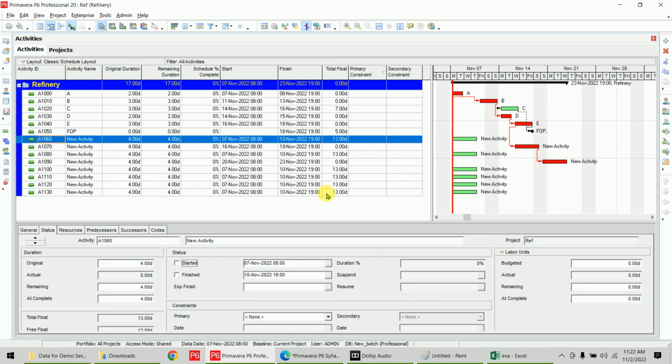Now you understand the use of group and sort and filters, and how you can sort your data, either with the help of filters or with group and sort. For group and sort, first you have to apply the codes, then you can sort your data according to the codes you applied. These are the two things that happen.